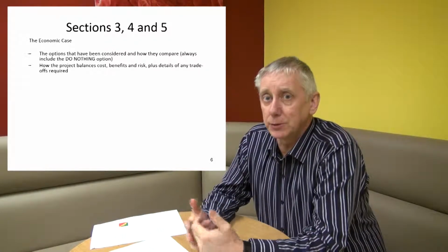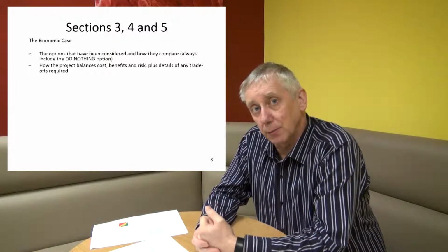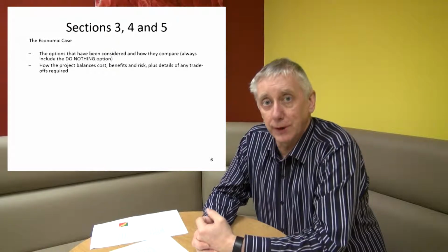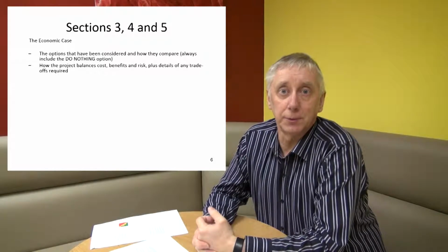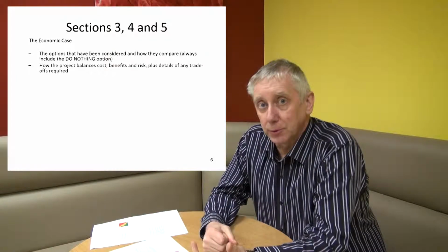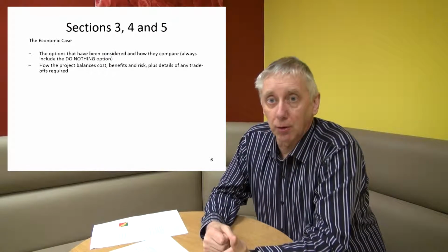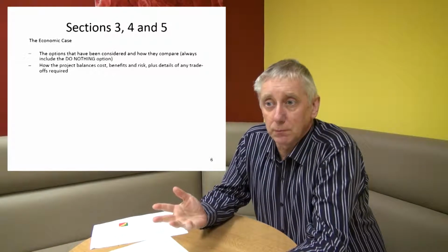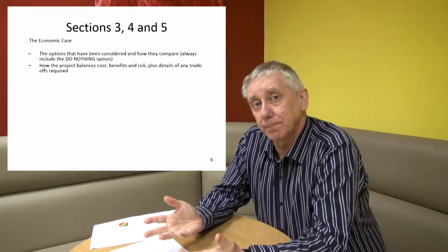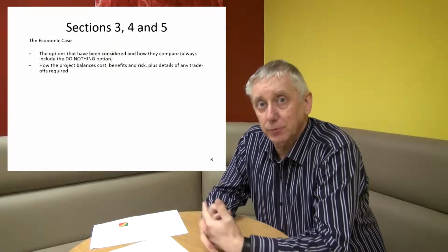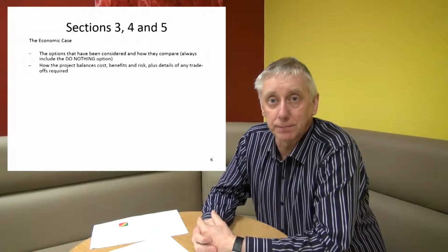But for the moment, you just need to know that the economic case you write has to show how the various options stack up. If you're going to want a proposal which says we need to spend money on 3 locum doctors, well, what other alternatives did you look at? And you need to compare and contrast those options, and that's where the economic case comes in.